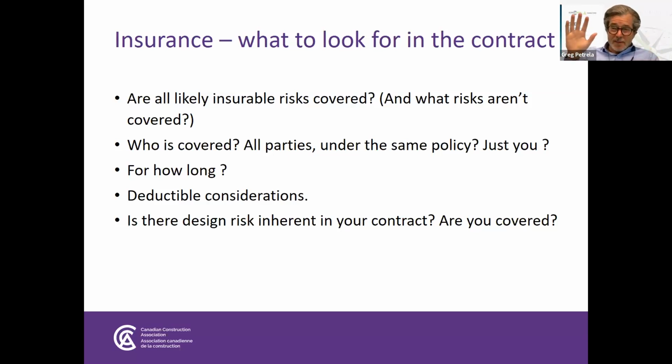On a wrap-up liability policy that an owner or a prime contractor may purchase for the whole team, they may procure it with a deductible of $50,000 or $100,000, as opposed to $5,000 or $10,000, which is typically contractually required.